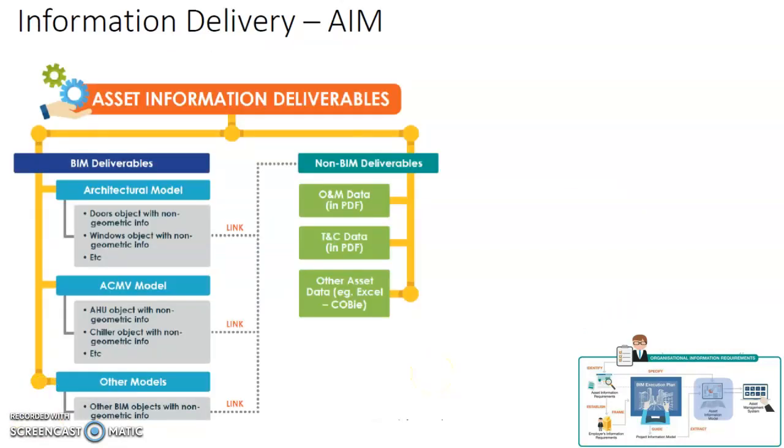And when the physical construction of the building is completed and you have managed to obtain your TOP and your CSC, and the building can be used, then there will be a handover of this digital model to the end user. So that goes into the asset information model, or sometimes we call it the 6D BIM model.